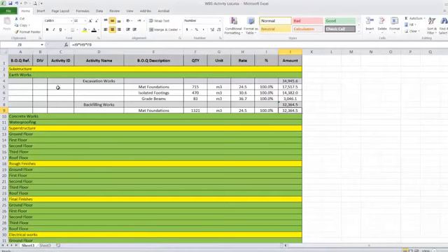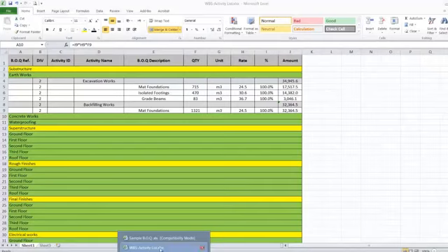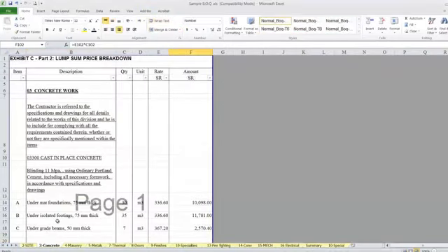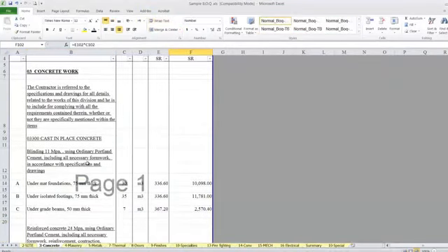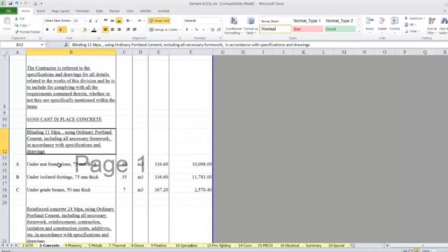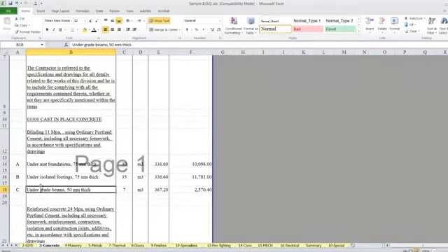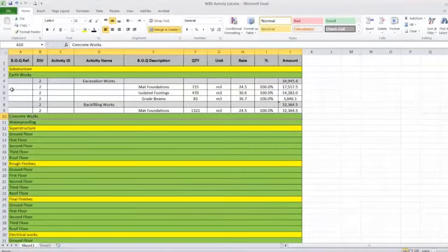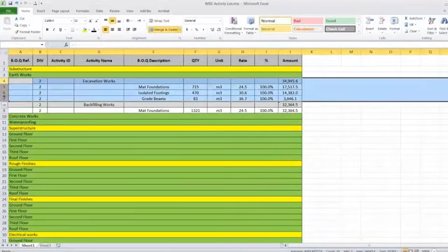We should put here the division of work, put it 2, 2, 2, 2. This will make it easy later on to monitor different divisions. Okay, I'll go to division 3, the concrete work. I have here the concrete work, the blinding, which is related to the footings. I have 3 types of blinding. So I'll create an activity for the concrete work with 3 types of concrete work,